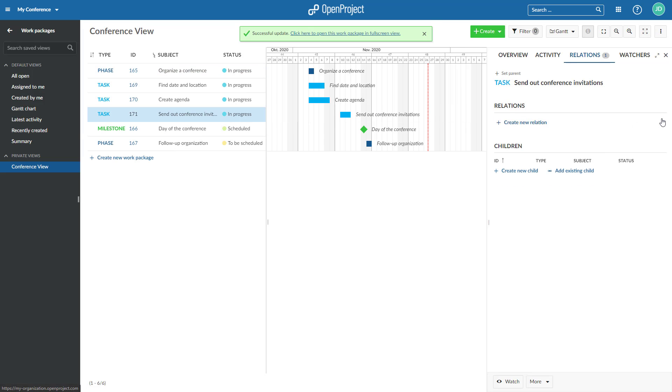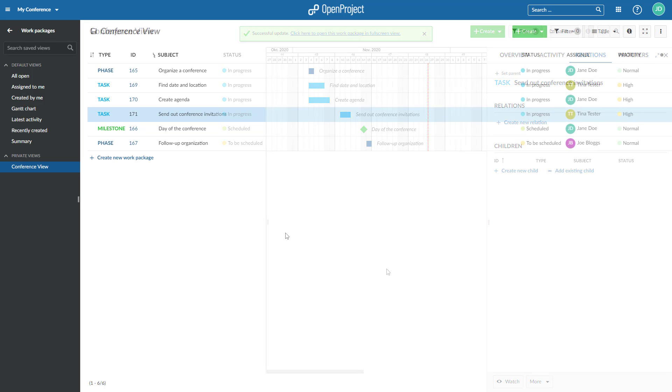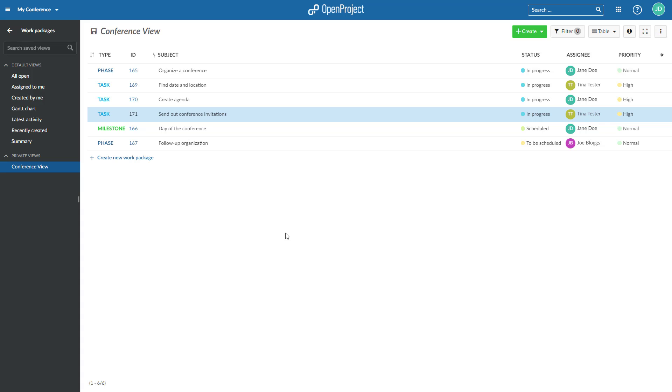As a user of the Enterprise On-Premises or Cloud Edition, you can visualize relations as columns in the work package list. This is useful if you want to get a quick overview of certain types of relationships between work packages. You can see, for example, which work packages are blocking other work packages or which are part of another work package.